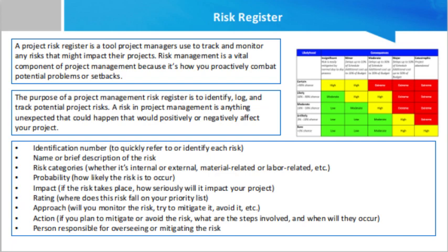You should customize these categories to your business and project. You may even choose to have columns for separate categories. For instance, you may want a column identifying what sprint might be impacted and another identifying what type of work, development, testing, etc. will be impacted.